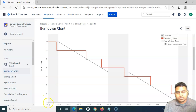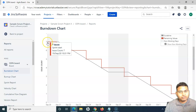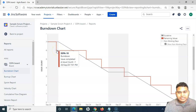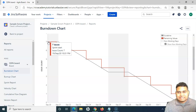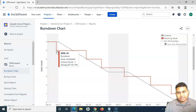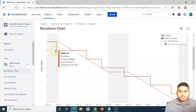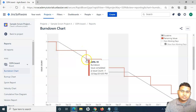If I go with issue count, on the first day of the sprint — September 19th — the number of issues taken into the sprint is seven. You can hover over to see the sprint start with an issue count of seven. One day progressed, and on September 20th one issue got completed, so the issue count dropped by one. Another couple of days passed and another issue closed on the 23rd. The chart stays horizontal for some days and then drops as soon as an issue is closed.